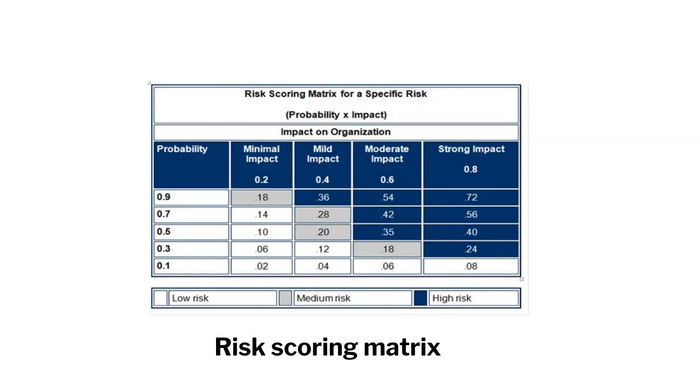The alternative assumptions should be evaluated in terms of their consequences for the project if they are later determined to be true. As an example of the impact which assumptions can have, consider the International Space Station program. The program was launched in 1984 with the assumption that congressional support and funding would be continuously available as planned over the 15-plus year life cycle of the program. However, the assumption regarding long-term availability of congressional funding and support later proved to be false.